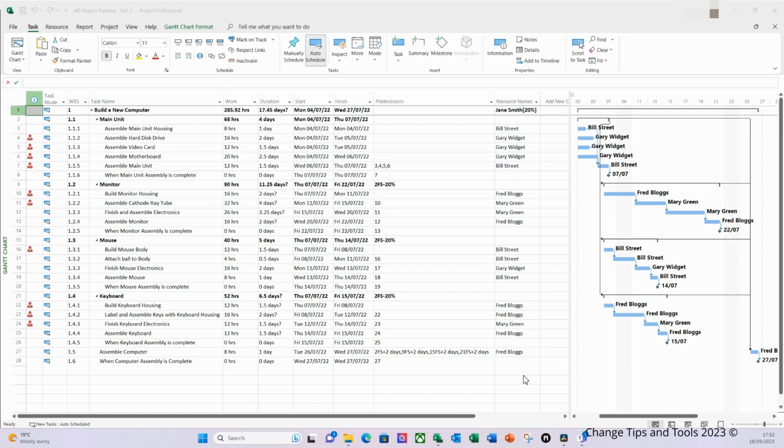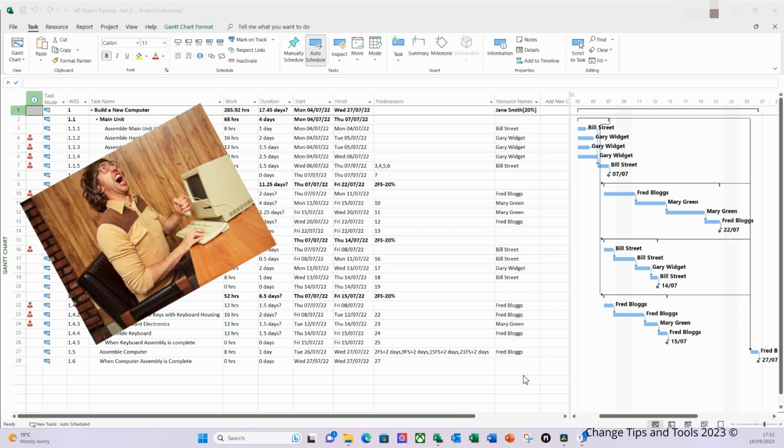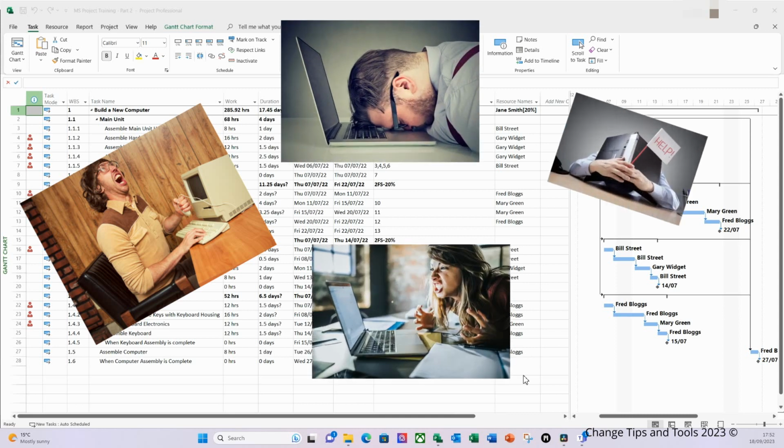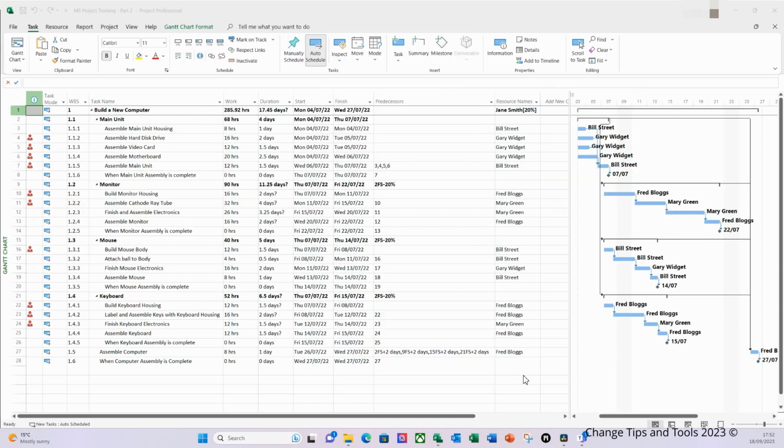If I make that adjustment, my task durations will be impacted, which is fine for my work-based estimate, but not for the tasks I entered an expected duration for. Many MS Project users become frustrated when trying to make these changes with seemingly unpredictable results. Mastering task types will ensure this process is no longer unpredictable.